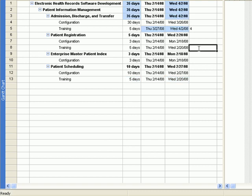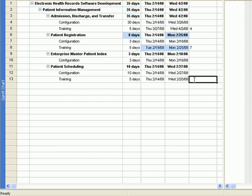For Patient Registration training, the predecessor is its configuration segment, which is task ID number 7. For Patient Scheduling training, the predecessor is its configuration segment, which is task ID number 12.